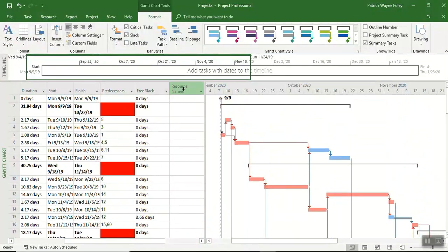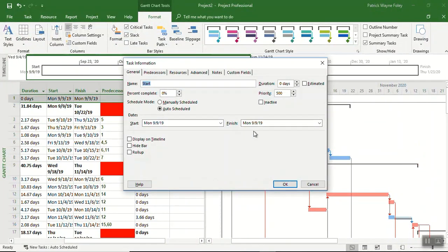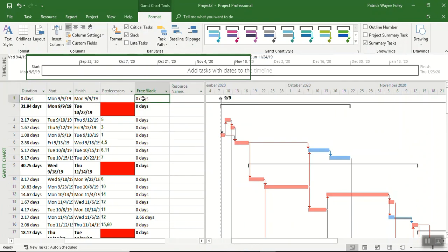Now let's continue with this, because what we can do is that, because now that we've got free slack, we can copy and paste this material back into Excel and begin this analysis of what we call finding our near critical paths. So again, we're just going to copy